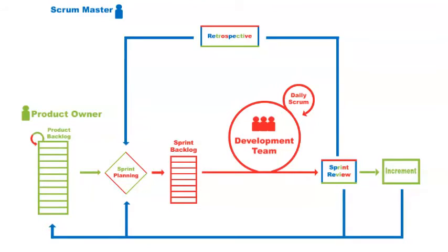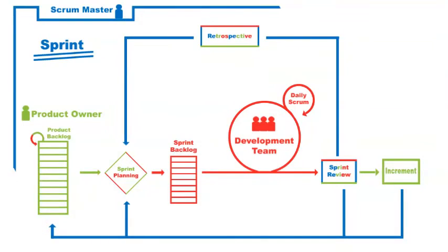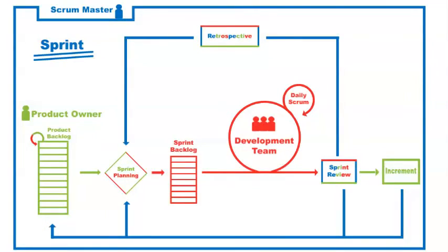The sprint. The last event that we will consider is a special event called the container event. This is the actual sprint itself. It is termed as being a container event because all the activities of Scrum occur within a sprint. In the Scrum framework, there are no activities, events, or other actions that are carried on outside of the actual sprint. Therefore, the length of the sprint should be such that allows you to carry out all the work to deliver done and a complete increment of the product within this time box.